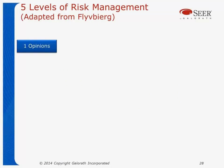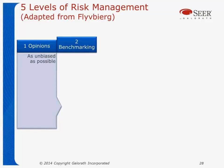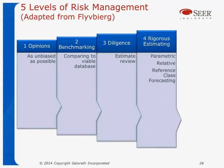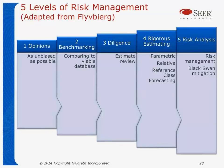There are five levels of risk management as well. Level one: opinions — 'I think it's going to be this.' Better than nothing, but not so good. Level two: benchmarking — comparing to something viable. Level three: actually doing due diligence, digging in, looking at what might be right or wrong and where things might be off. Level four: using serious and rigorous estimating — reference class forecasting, parametric modeling, estimates by comparison. Level five: full risk management and looking for black swan mitigation. Black swans are the things that go wrong that people would never have thought would go wrong. These are five levels of risk management that should be applied to estimating.